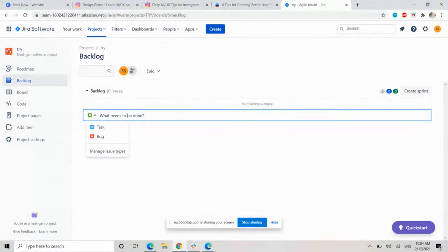So can you give me an example of a story in the Lulu app or something like that? So a story could be, as a user, I need to use a username to log in the app, but actually it is like Emirates ID. Yes. So instead of writing a boring functional requirement document that says the user can do this, can do that, he will be able to do this, that, you switch and you say, as a user, I need to log in with 2 clicks, or I want to log in with 2 clicks with single sign-on.